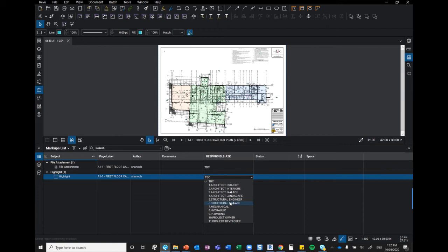When I've done work on grade separation works in Melbourne for the train lines, there were very particular rules we had to set out for the size of the platforms. And if a column got too big, we had to realign the center of the columns because, by the time we pack it out with all the things that we need from the architect and put a bin in front of it or something, the pier was not wide enough. So these things have to be documented.